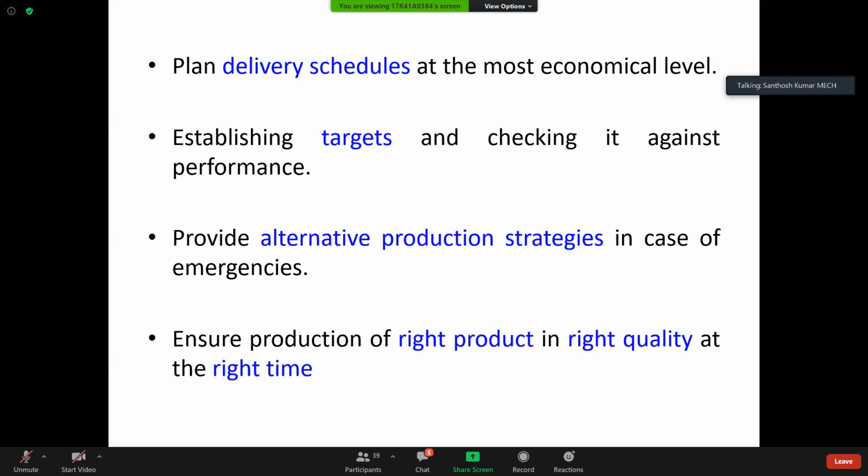It's very simple. On the left side there are many project names, and above there will be the axis with months or weeks. In that Gantt chart, generally every week they call all department heads and ask about their status, and they fill in that tab: green if it is complete, red if it is not complete, yellow if it is going to complete. If you search in Google after the class, you will understand what a Gantt chart is. Next.